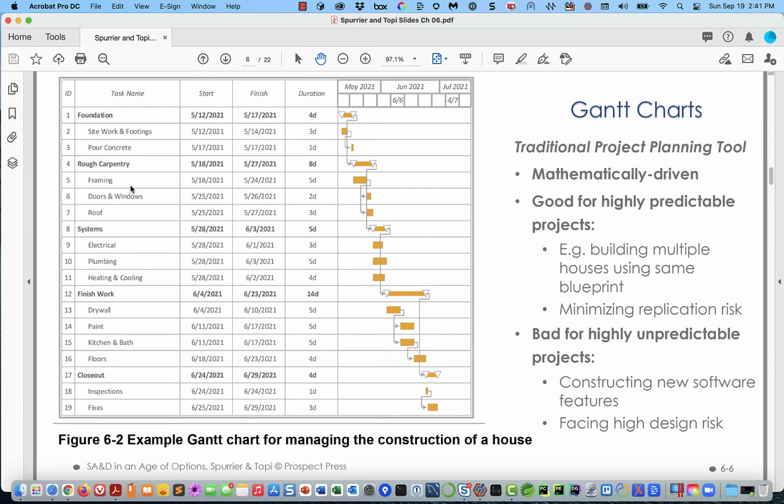You're going to put on primer paint. You're going to prime it, and then you're going to put on a finish coat, and then you're going to probably put on a second finish coat, and then you're probably done, right? So you have to do each of those in order because they're sequential tasks, right?